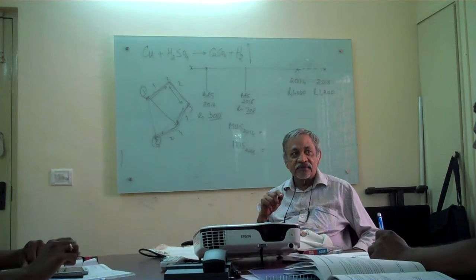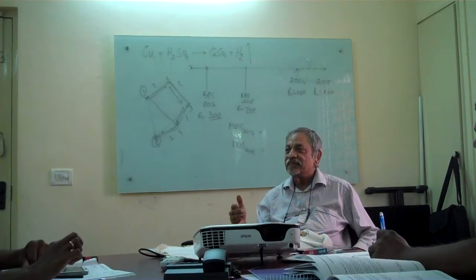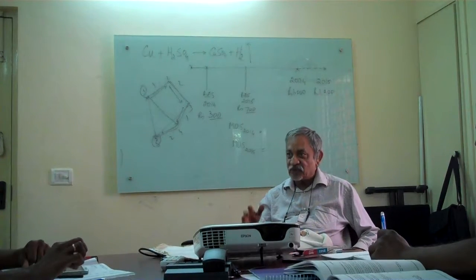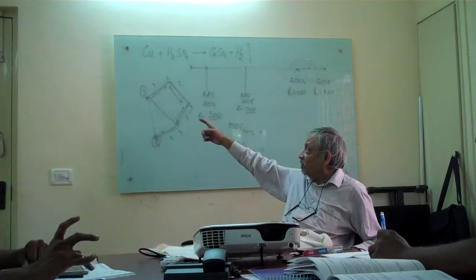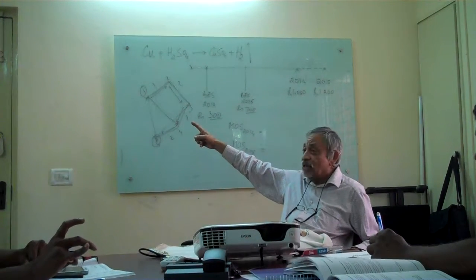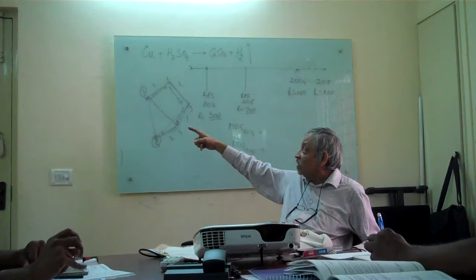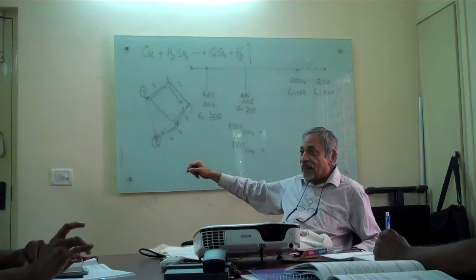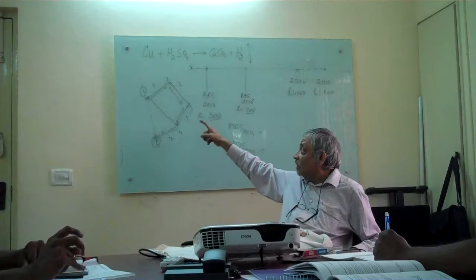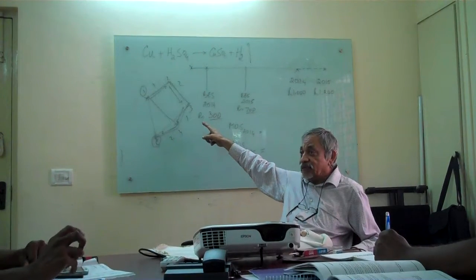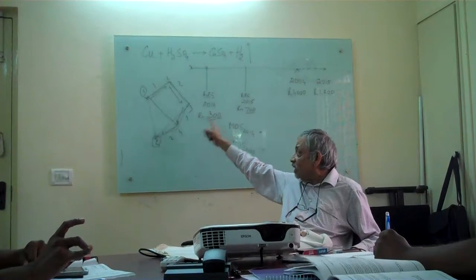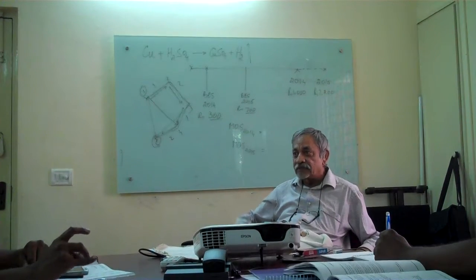Now, instead of taking one station at a time, if technically it is possible, I can take the same material to proceed from one batch going to 2, another batch going to 4, and by the time those are completed, perhaps 2 can go also to 3, and 3, since 4 is already over, can go directly and undercut one station.